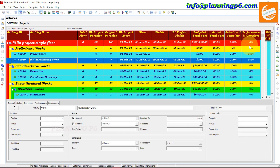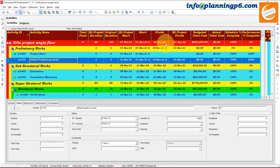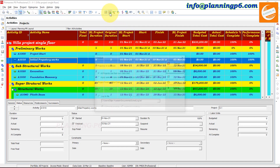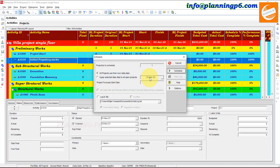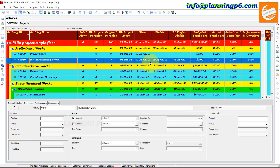Now you can see the schedule percent complete is 100% up to now, because we were supposed to complete this project on 21st of January 2022. But until now, only two activities have been started and completed, and we have scheduled this project on 20th of March. Up to 20th of March, this is our delay.